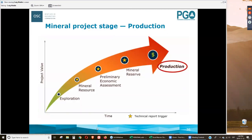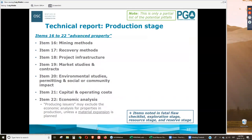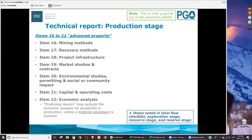At the production stage, you generally will not need new technical reports during production. The things likely to trigger new reports are material changes to mineral resource or mineral reserve estimates, or major new developments such as a new zone, a transition from open pit to underground, or a significant expansion. Production-stage technical reports still require items 16 to 22, with one exception: a producing issuer can exclude the economic analysis for a property that is currently in production, unless there is a material expansion plan. If a new reserve estimate or mine plan is there to justify a major expansion, you must demonstrate that the cost of capital is justified. Otherwise, you only need to justify your mining to your cutoff grade.